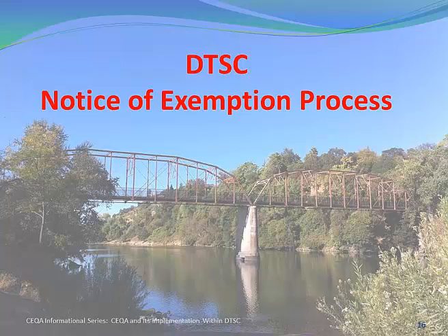My consultation with OPR as well as legal research and so forth is that when you have a renewal, in general, the existing facility exemption is not going to apply, particularly when some agency prepared a negative declaration or an EIR for the previous approval of the facility.